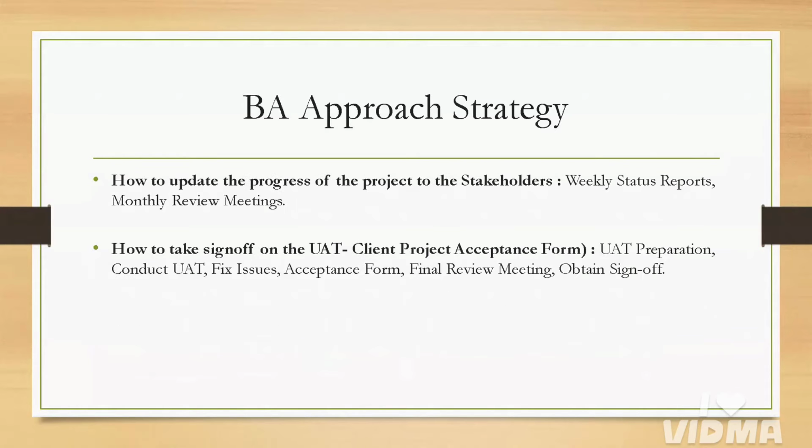And coming to how to update the progress of the project to the stakeholders, after any meeting, we will prepare the MOM, right? Minutes of meeting, and weekly status reports. So everything will be reported and will be submitted to the client. Okay. So that's how we will provide the update of the project.